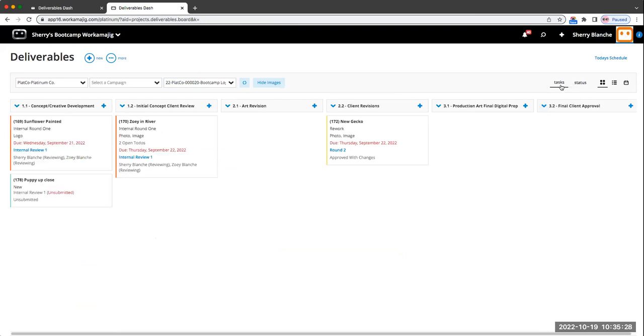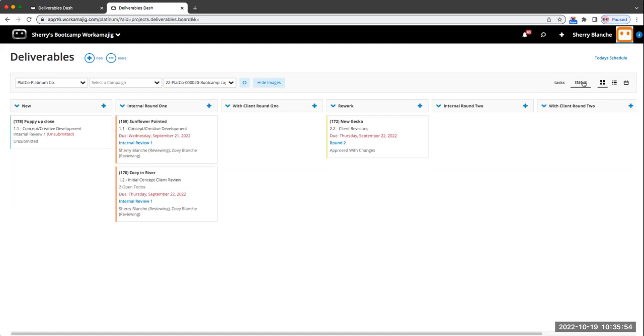Now, a lot of people do use their task and schedule to arrange and know where the deliverable is. That's fine. You can use both. You can use a status. You can use the scheduled task. Some use both. Maybe your statuses are entirely different than what's in your schedule. There are some I've seen that only use status. So they don't really have a timeline schedule. They just simply want to have a status, and the status can really be the tracking where it is.